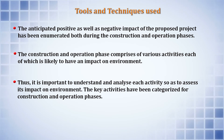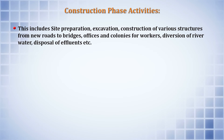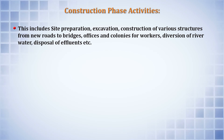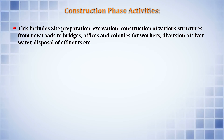The construction phase comprises various activities including site preparation, excavation, construction of structures such as new roads, bridges, offices, and worker colonies, diversion of river water, and disposal of effluents. Since construction activities can span one year or more, normal working activities for residents and offices should not be affected, so diversion plans and new road and bridge construction also need to be described in the project proposal.